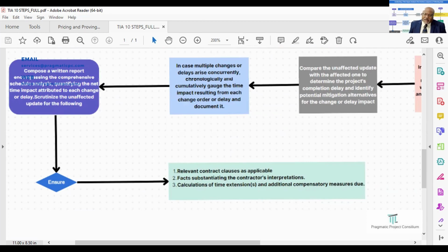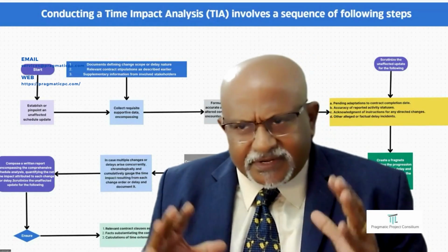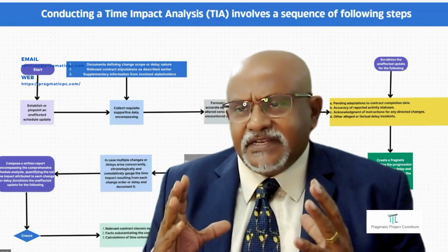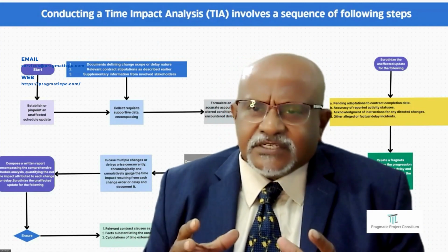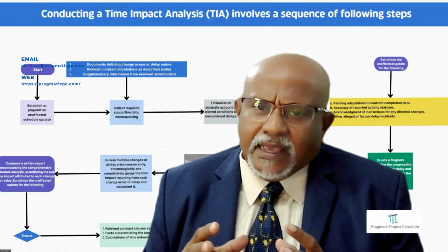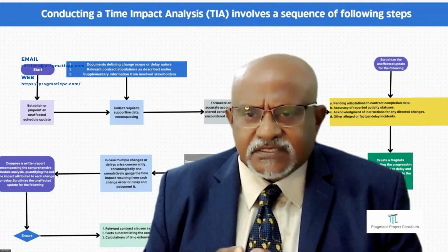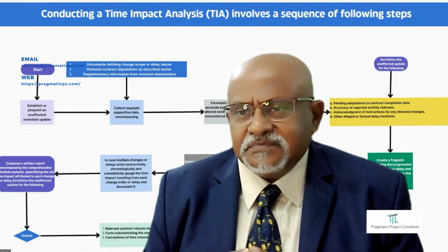Now, the very interesting part is that following the contractor's completion of the time impact analysis, once it has been completely done, several further steps are necessary for a comprehensive assessment. The contractor must analyze to identify the party accountable for the delays, whether it is a contractor's delay or a client's delay. Connecting the delays to accountable parties through root cause analysis is very much essential.